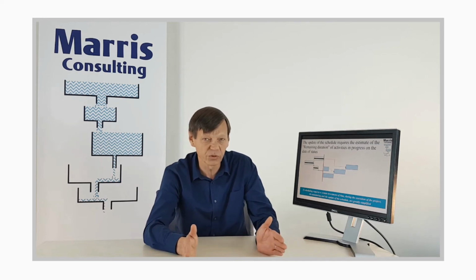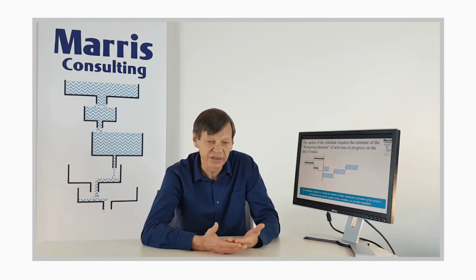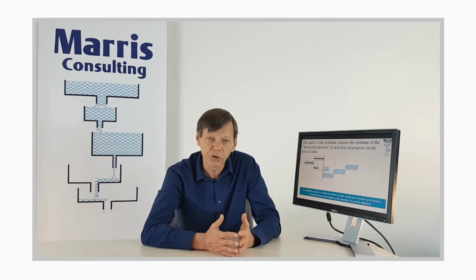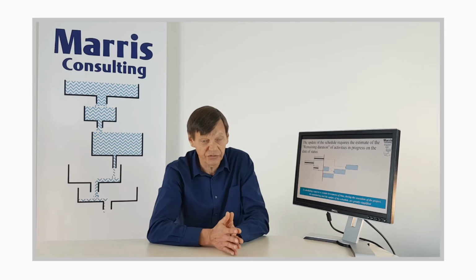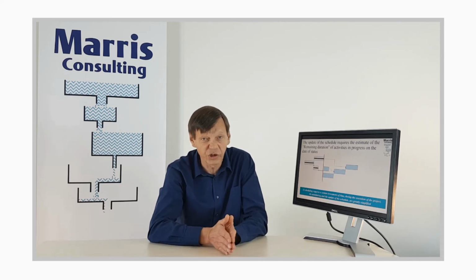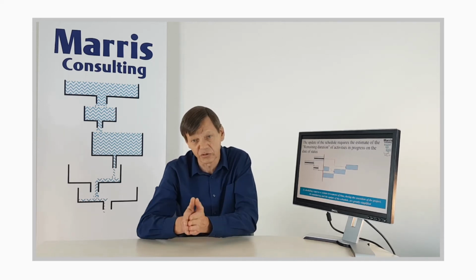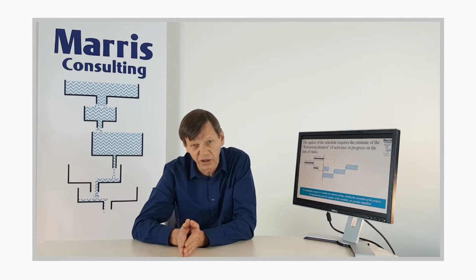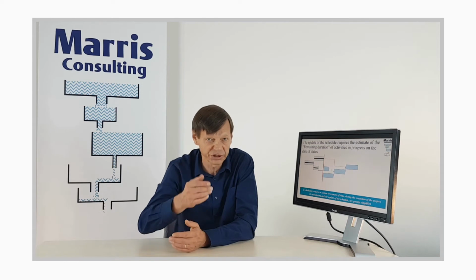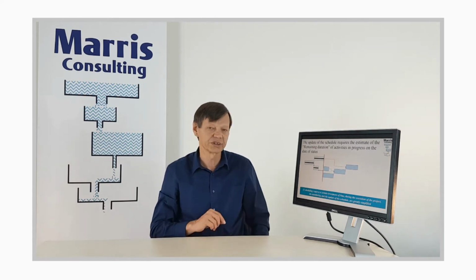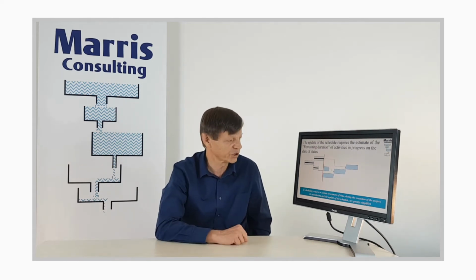So I'm going to go over what was expected. And that is perfectly normal, because I remind you that the times that we're putting in the system are normally focused average duration. So in half of the occurrences, I'm going to, and I'm perfectly allowed to, spend more time on that task than was planned. Okay, that's not a problem. We'll see why, or you know why if you've been following the series, because of the project buffer.